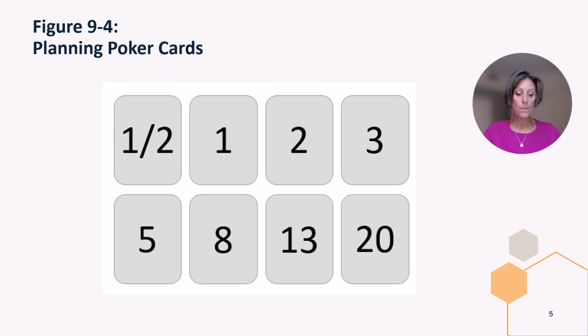An important component of the daily stand-up meeting is that it is designed for information sharing only. If a team member has encountered a problem or challenge and needs help from another team member, or another situation arises, these issues are addressed outside of the daily stand-up meeting. In fact, team members physically stand in front of the Scrum board to share their project status reports, since standing versus sitting reinforces the short duration of the meeting.